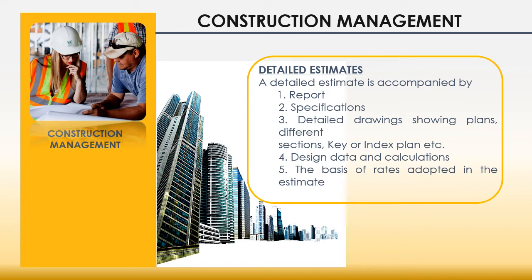Next one is detailed estimate. The detailed estimates are prepared by carefully and separately calculating in detail the cost of various items of work that constitute the whole project from the detailed working drawings after the design has been finalized. The mistakes, if any, in the rough cost estimate are eliminated in the detailed estimate, and detailed estimates are submitted to the competent authorities for obtaining technical sanction.